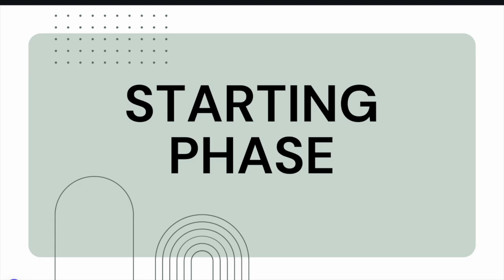Starting Phase. This phase is for projects that have a concrete idea and are ready to be implemented by a specific lab member. As a PI in the lab, it is your responsibility to identify lab members to be responsible for this project, akin to a first author on a paper. Have a conversation with them about the project, gauge their interest, and assign them as the responsible lab member for the project if they seem interested.